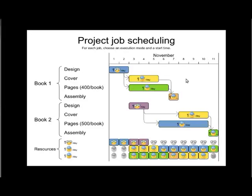Then we assemble the cover and pages, which takes another day. After seven days, Book One has been produced completely. Book Two is pretty much the same except it has 500 pages per book, so it takes five days instead of four days to produce all the pages.